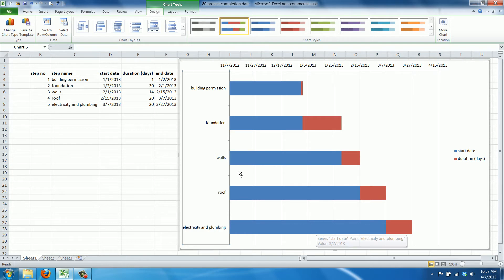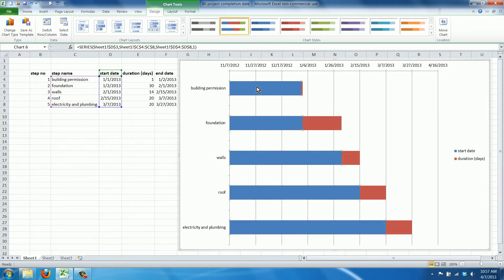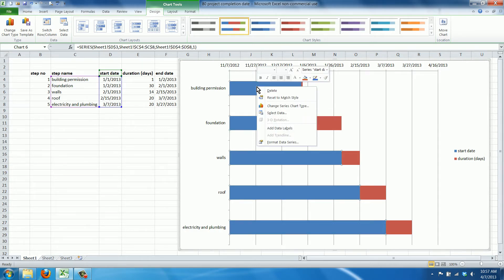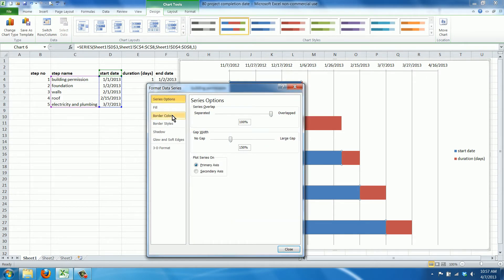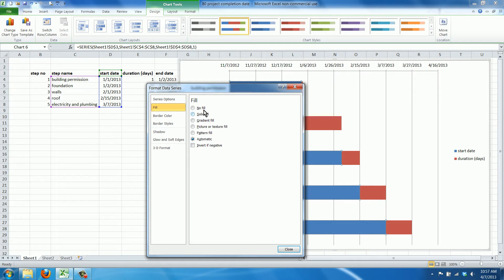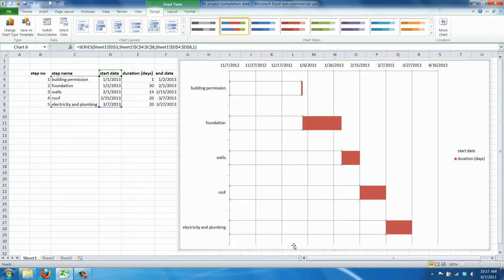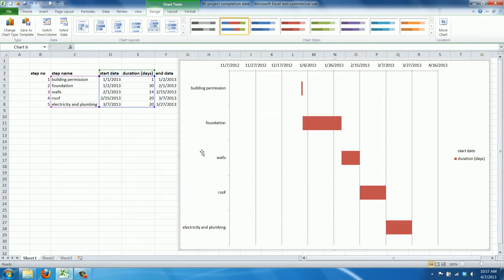Now we're going to lose the start dates. We're not actually going to remove them, we're just going to make them invisible by clicking format data series and selecting no fill and no border. As you can see once I click somewhere else they're gone, but they're still pushing the duration days to the correct dates. So that's why we need them.